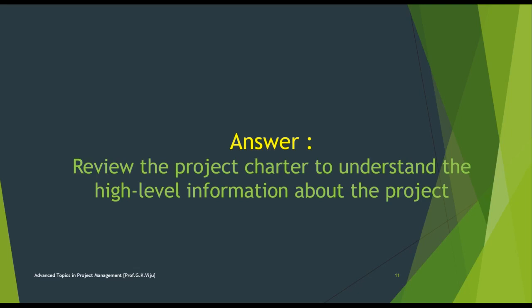The first one, conduct a project kickoff meeting to inform and engage stakeholders and gain commitment, is incorrect because the project kickoff meeting is usually associated with the end of project planning and the start of execution. Therefore, the kickoff meeting is not likely to be the first activity for project planning, making it an incorrect answer.